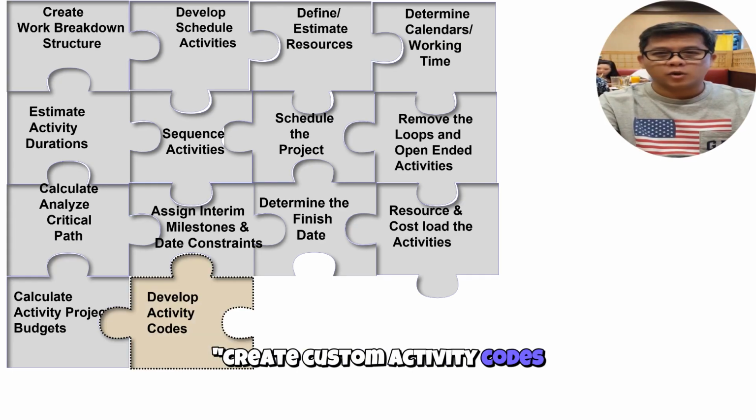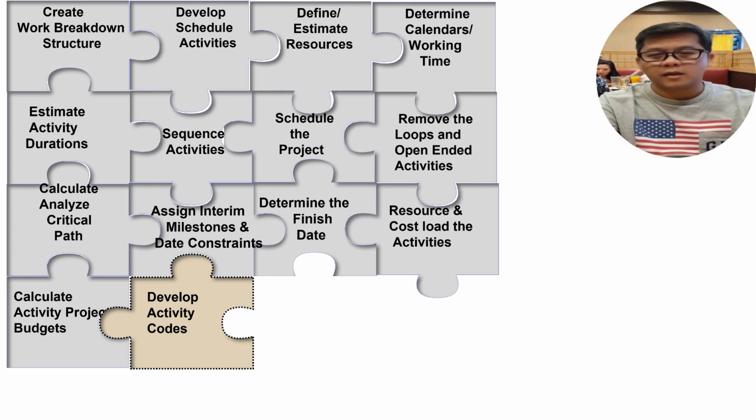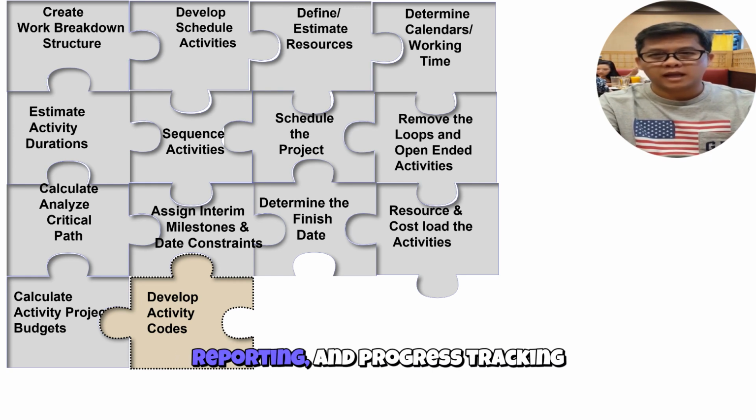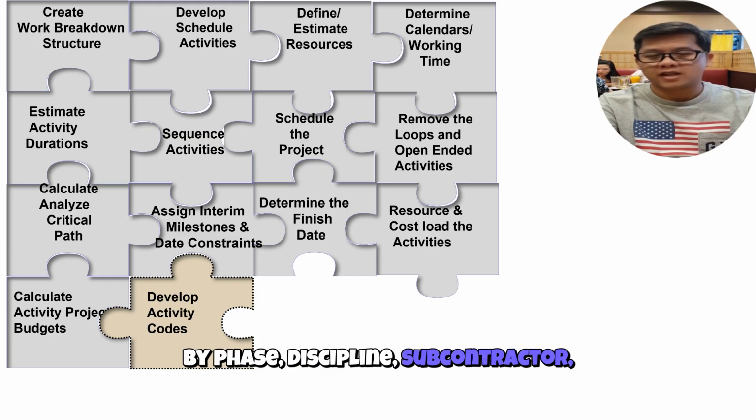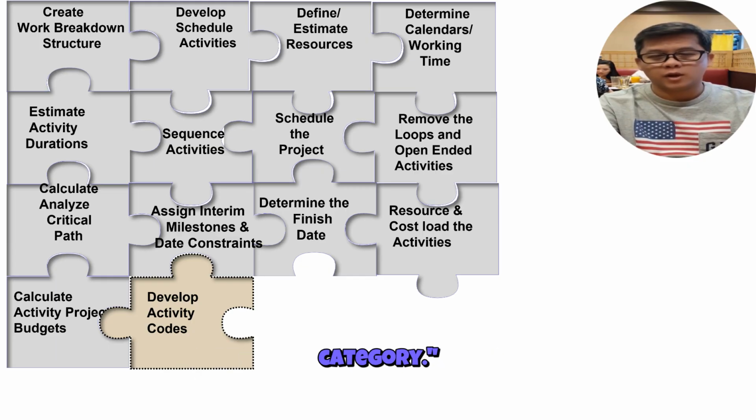Create custom activity codes to group, sort, and filter tasks. This supports layout customization, reporting, and progress tracking by phase, discipline, subcontractor, or any other meaningful category.